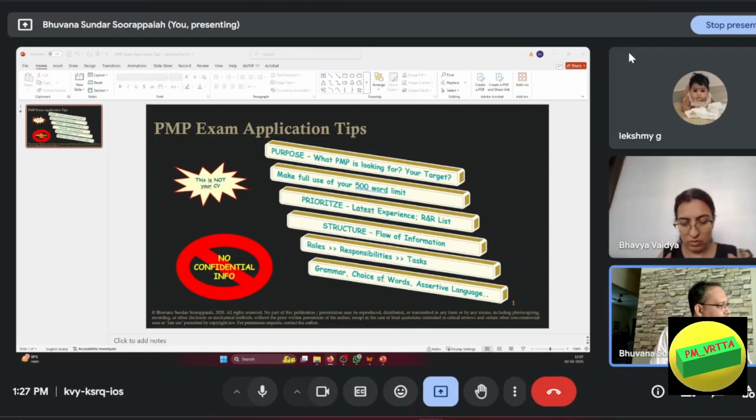I'm talking about my role. You can have the equivalent from your role. The most interesting thing, risk management. I am the owner of the risk. As the owner of the risk register for my project, I ensure that all the risks are captured through constant interaction with the stakeholders, including the customer, my management, my peers, my team members, and everyone. I assign ownership of various risks to my team members, and through constant risk management meetings, I ensure the risks are constantly monitored and controlled.